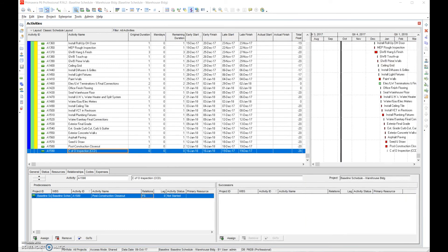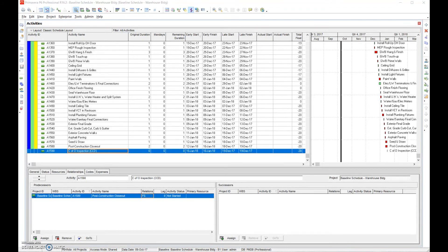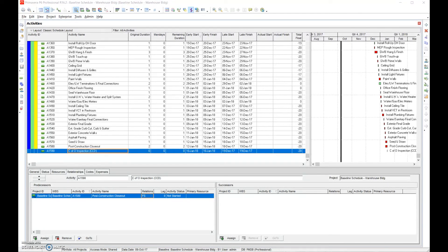The important thing on the recovery schedule is simply just to, if you're going to own, if you have to own the delay, figure out a way we can get it done. And as I talked before, those four ways are the only way you can get it done. If you utilize all those four ways, and in the end, it still can't get done, then it can't get done. It's really that simple. So we just need to be able to be honest and straightforward. Remember, we only want to recover time that we lost due to our delay. There may be a concurrent delay in there, but we have to own the time that we lost.